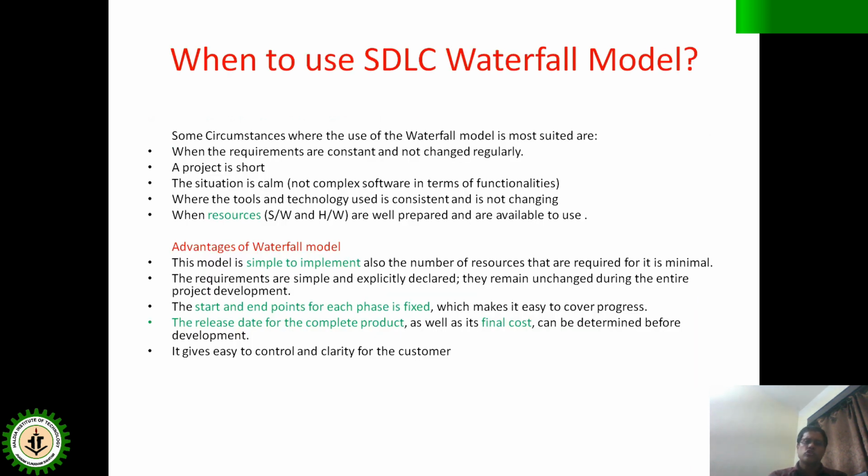So when do we use the SDLC waterfall model? We use it when the requirements are constant and not changing regularly. That means we know beforehand what requirements are needed to develop the software, and those requirements do not change midway through the development process. Only then can we use the waterfall model. Why?